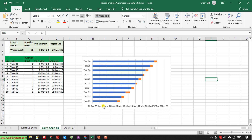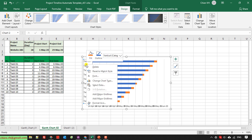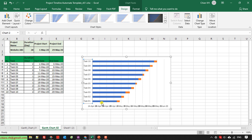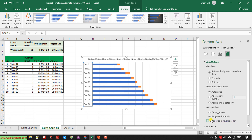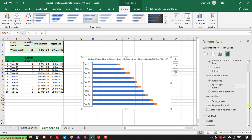I want task number one to appear at the top of the chart. I select the task name axis, right-click on it, and select 'Format Axis.' In the Format Axis panel, under axis position I select the option 'Categories in reverse order.' Now task number one is at the top, and the timeline axis has also moved to the top.